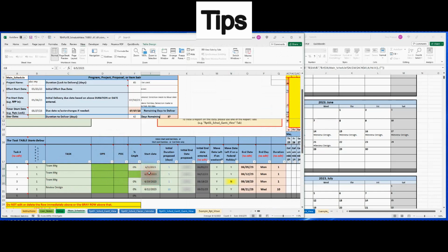You could say, since this falls on a Monday, we change this to a fixed date. Well, what you could have said was equals that date plus 7, and then it will automatically change to the same day, but it's all relative. And again, this one equals the one above it plus 7.